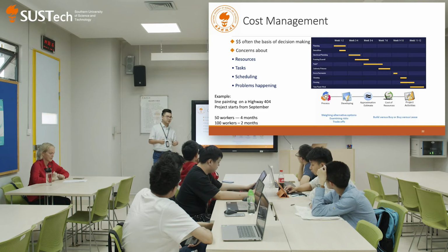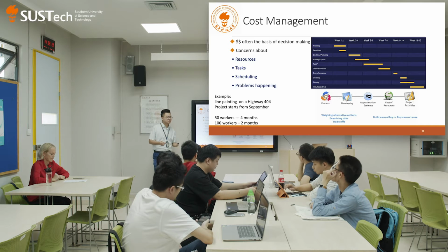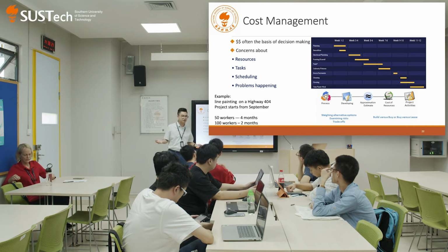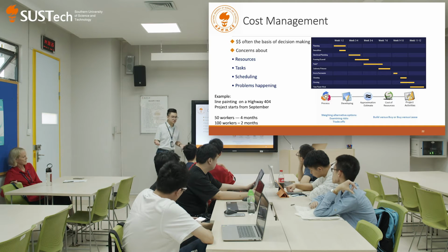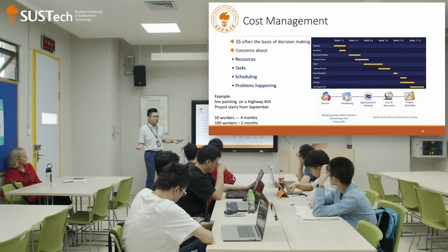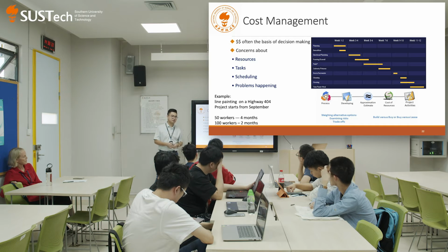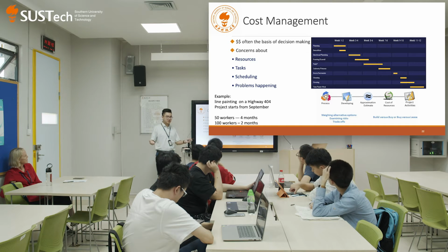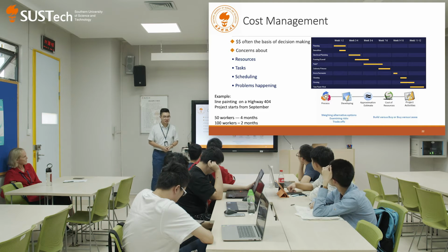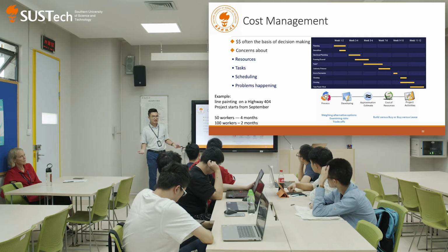So for example, when you see a building along the street, we are constructing a new building for our engineering department, right? So we're doing the engineering building construction. For this project, at the pre-planning stage, of course, we're going to hire architects to design the building, to do the drawings, all these things. But at this time, do you think I need to hire a bunch of construction workers to hang around? I don't need to do that. Why? Because I don't need them.